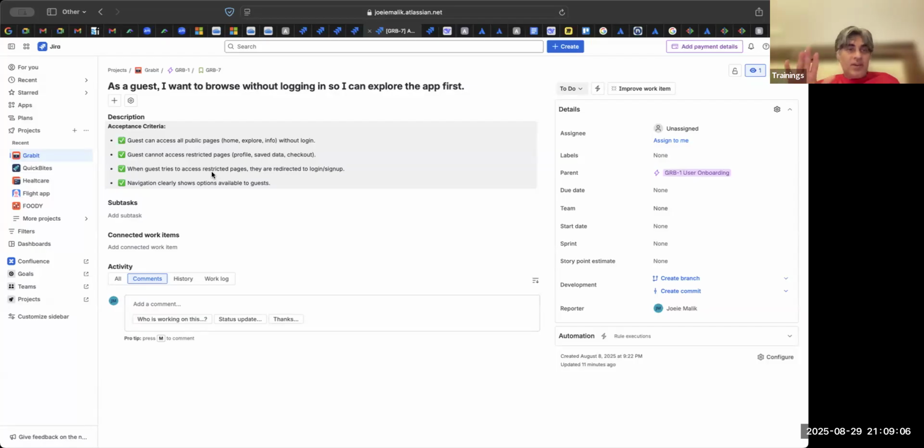So as a Scrum Master, the first thing is that this call is happening. The grooming is happening. Sometimes QAs are not included in these grooming calls. They don't know what the requirement is. Then they are expected to test it, and they end up making a lot of mistakes. They are not clear with the scope of the story. So your first job is to make sure it is a shift left culture, which is QAs are there from the very start. That is your role. QAs are there in the grooming calls from the very start.